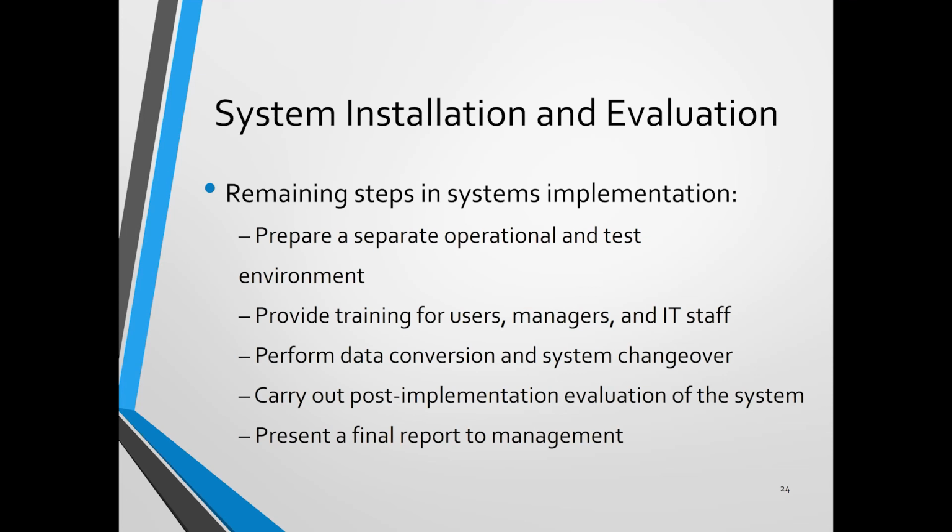For the data conversion, sometimes we may have to spend a month. But when can we do the data conversion? When we know that the system is finished already, then you can start doing the data conversion. Or with some systems, we gradually collect and gradually convert the data. For example, say that the system we are going to implement here